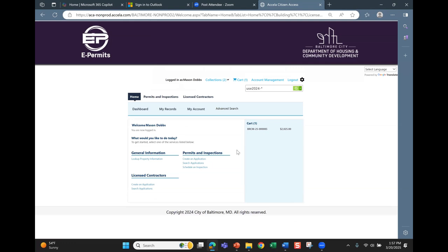Okay. I'm sorry, say the last couple things for reinstatement again. Okay, so you're trying to extend this permit for what? You still have work to do? Yes. So if the work is not complete, you're not eligible for a reinstatement. And because the expiration date is beyond 90 days, you have to just reapply for the work.